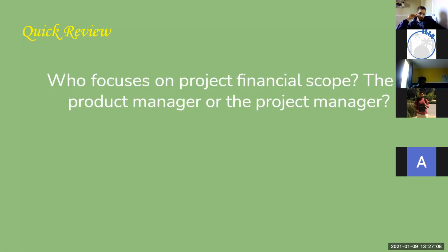So for example, let's say the project became so expensive. The project manager is identifying risks and the team is working on it, and he's communicating back to the product manager saying, you know what, our project's no longer going to be $100, it's going to be $300. His role stops there. He or she mentioned what the cost is about and the overrun, but the product manager is the one who needs to make a call. Should we continue this project or not?